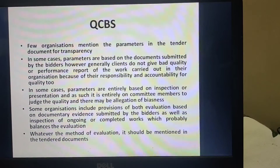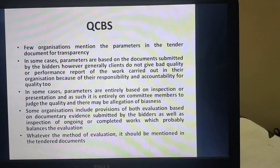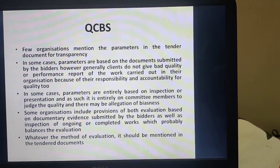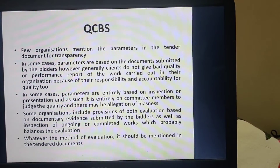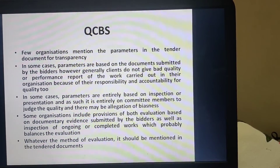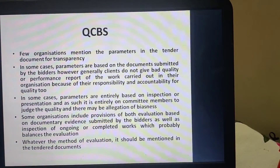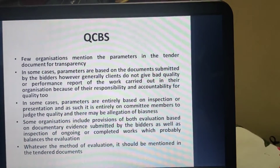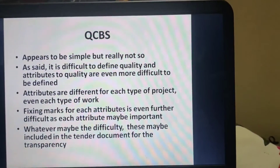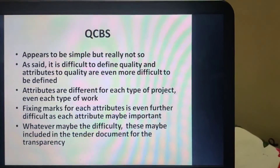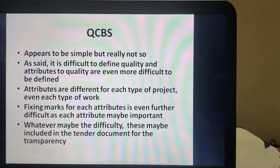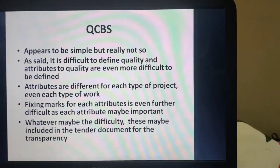Some organizations include provision for both evaluation based on documentary evidence submitted by the bidder from the client under whom the work was carried out, as well as inspection of ongoing or completed works, which probably balances the evaluation. Whatever method of evaluation is used, it should be mentioned in the tender document. Assessment of ongoing works can provide quite a good report of how work is actually being carried out by the contractor.